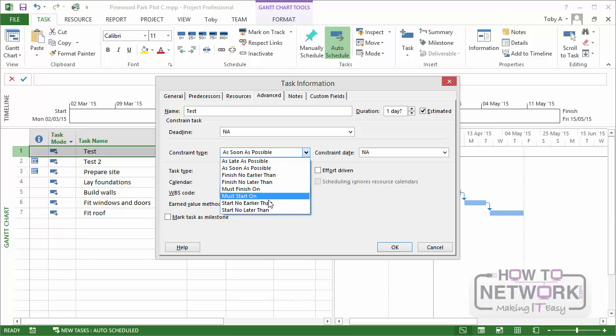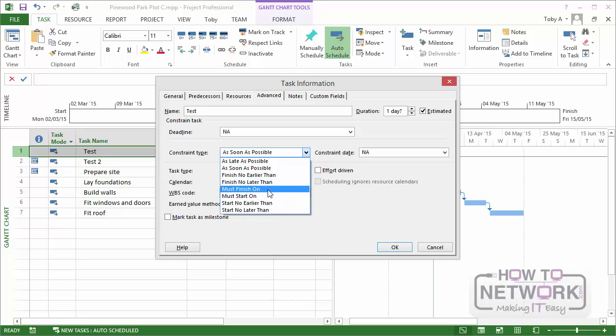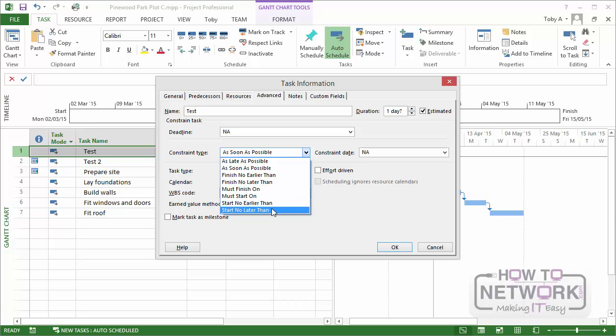And the six other constraint types, not the top two, these six, all need a date. So finish no earlier than, finish no later than. Must finish on, so that's the exact date. Must start on, that's the exact date. Start no earlier than, start no later than. So those are the eight constraint types. And of course we'll be looking at most of these during the rest of the course.